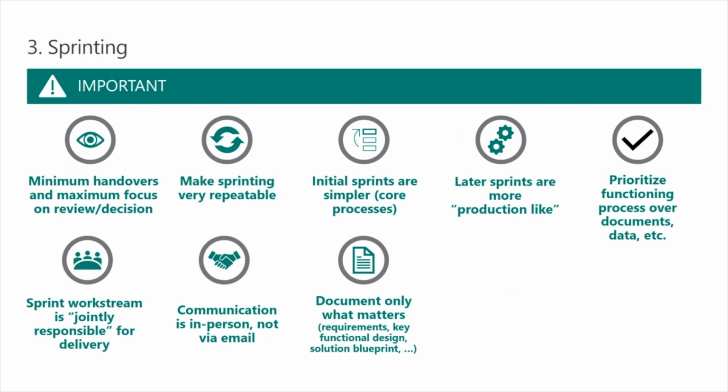So the idea is that the solution architects and the PMO are helping you by looking ahead at the next sprint and saying, I can foresee there are 3 business decisions I need to get from the business in order to know which design direction I need to take. Or I've got 3 things I know I need to take to the technical design board for approval.